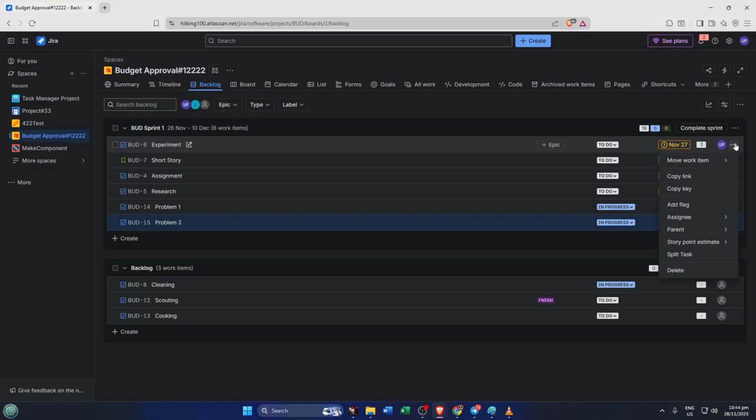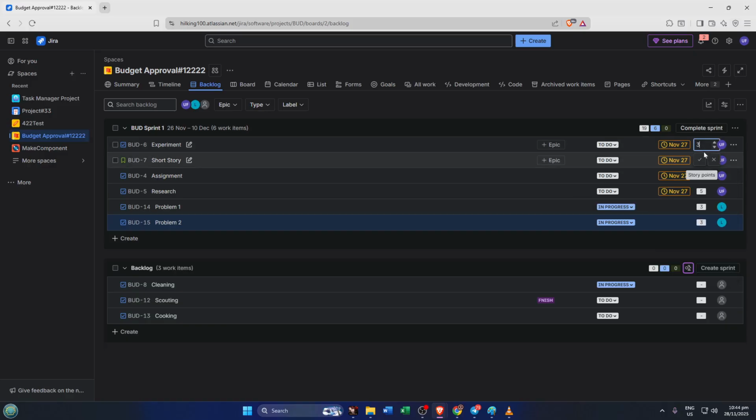Up next, let's get down to the estimation settings. This is the heartbeat of our Burndown chart as it informs Jira what exact data to sketch on the vertical axis of the chart. Upon clicking on the Estimation tab in the Board Settings menu, you'll encounter a section called Estimation Statistic. Now this is where you tell Jira how your team measures work. It could be in story points, which most agile practices follow, or original time estimate, if you guys are more comfortable estimating in hours or days. There's even an issue count option if you wish to measure the number of issues instead of the effort.